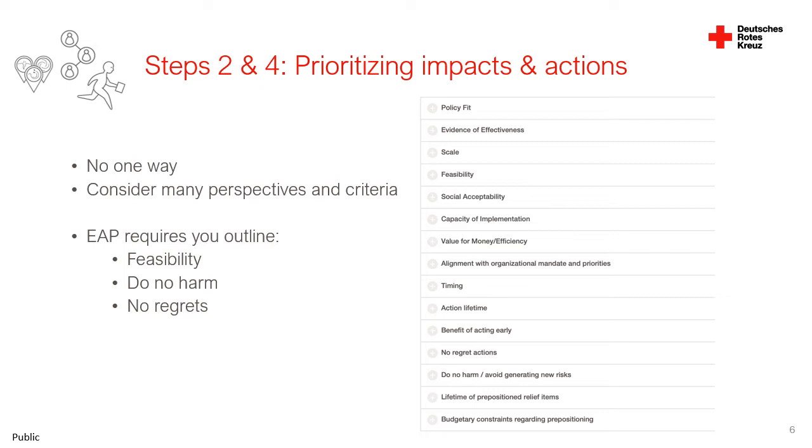Also note that the Red Cross, Red Crescent Early Action Protocol guidelines put forward by the Validation Committee for FBA by the DREF require that you demonstrate feasibility, do no harm in the implementation process, and select no regret actions whenever possible.